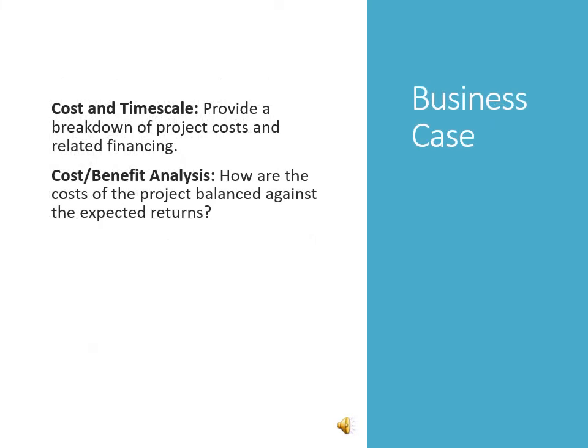We should not forget about the cost and time scale within the business case, where you provide a breakdown of project costs and related financing, together with a cost-benefit analysis: how are the costs of the project balanced against expected returns?